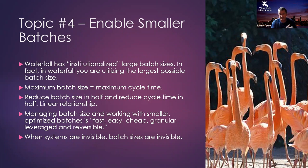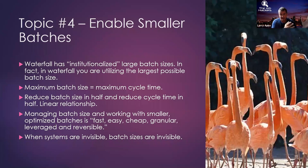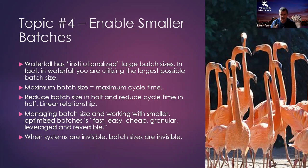Because of that, we're moving huge batches of work through the system. It's a phase-gated approach — if we're following waterfall correctly, you're going to gather all the requirements before moving them to the next phase. One of the big differences with agile and waterfall is that agile moves things in shorter spans of time with smaller batches.